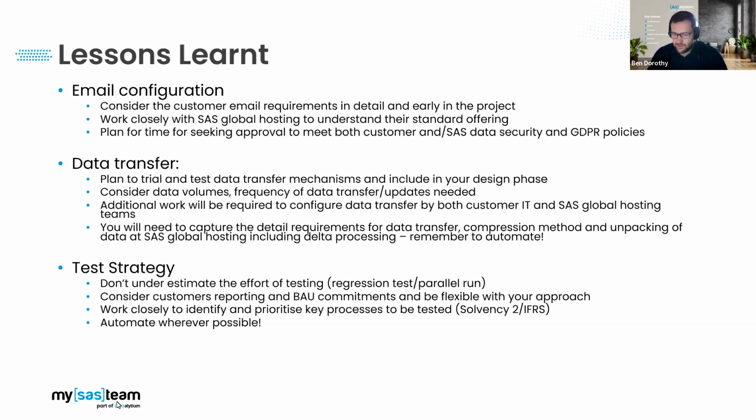So that's one particular area that we had to deal with a bit later in the project. When we were testing email configuration, we hit some technical issues that needed to be addressed, which could have been addressed up front had we considered some of the details in there.